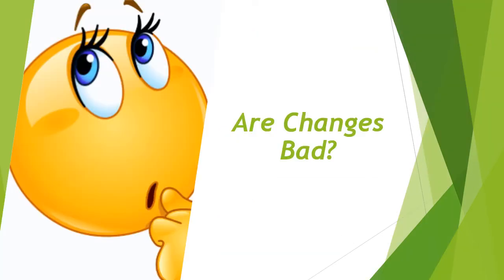So, is change bad? Well, it's difficult to answer, and it varies from situation to situation. Changes can have negative impacts if there are a lot of changes on a project. In this case, it becomes very difficult for the project manager to coordinate the work because it is always changing, right? Team members who are working hard to complete their work on time are also distracted from that work to help implement or evaluate changes.